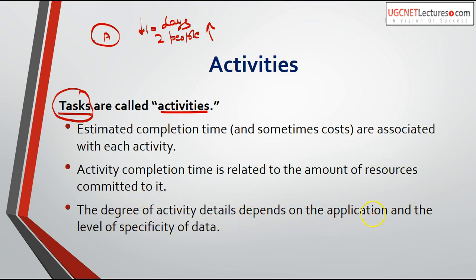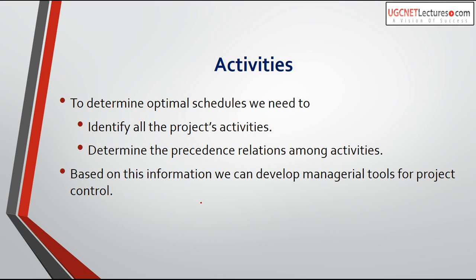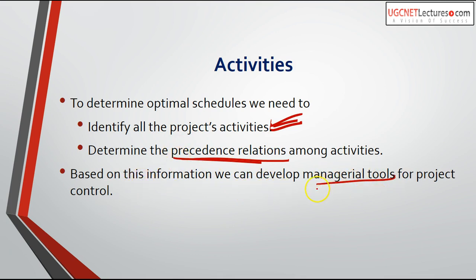To determine an optimal schedule, we need to identify all the project activities. You must clearly declare what activities are required to complete the product. Then determine the precedence relations among activities — which activity depends on which, which activity is the parent of which. Based on this information, we can develop managerial tools for project control. We have some tools for project scheduling.